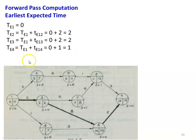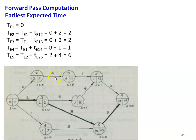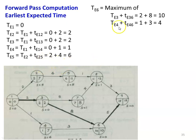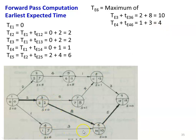Then TE4: there is only one incoming arrow, so TE4 equals TE1 plus t(1,4) equals 0 plus 1 equals 1. Then TE5: again only one incoming arrow, so TE5 equals TE2 plus t(2,5) equals 2 plus 4 equals 6. And TE6: there are two incoming arrows, so we take the maximum. TE6 equals maximum of (TE3 plus t(3,6) equals 2 plus 8 equals 10) and (TE4 plus t(4,6) equals 1 plus 3 equals 4). The maximum value is 10, so we assign 10 here.